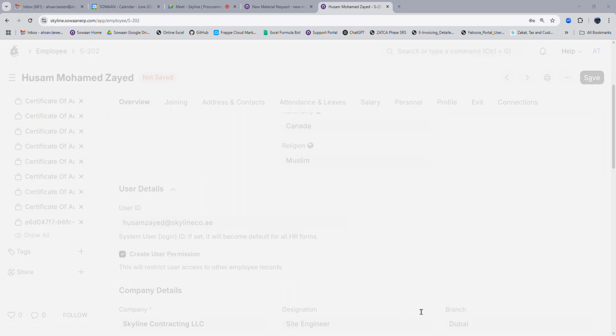The same store is going to be something matching with your on-site store, and you must create an on-site store same as your project, with the same name as the project name. Yani. You should have a store here with the same name as D1. So you see, Osam does not have access. He does not have access to create the warehouse.